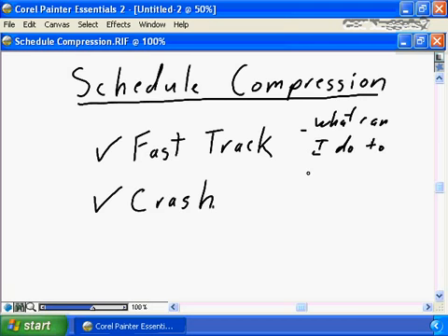to do it faster? So what can you do to do it faster? Can you change dependencies? If you look at the various dependencies you have in your network, if you say that C is dependent on B and E is dependent on D, are those in fact true mandatory dependencies?